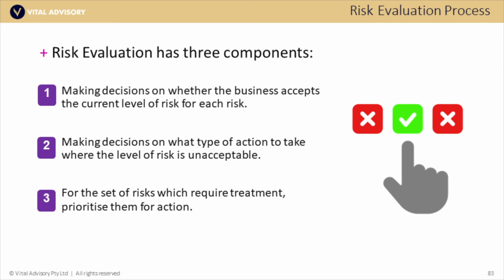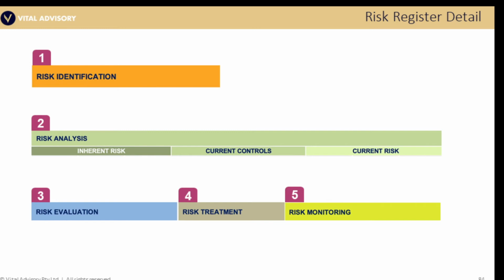Okay, so we've done risk evaluation and we've determined treatments. If we were to capture this in a risk register, this is typically what it looks like. We have some fields around risk identification. There may be half a dozen fields here. In a top-down model, you could connect it to a business goal or objective, and that would allow you to filter or search or aggregate based on that objective, which is a really useful thing to do. You probably want to have risk ownership in there. You might want to have business unit or system or asset in there as well, just so that you can sort and search on these to find which risks affect what part of the business or what asset.